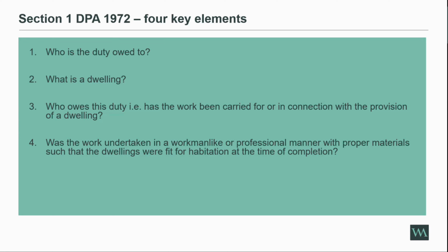A retirement or a care home is not quite as clear. Again, it would depend on the facts and also the nature of the accommodation. If you have a care home which is an individual residential unit, maybe a sheltered living arrangement where residents have their own private space, but there is care available if needed, that's likely to fall within the scope.